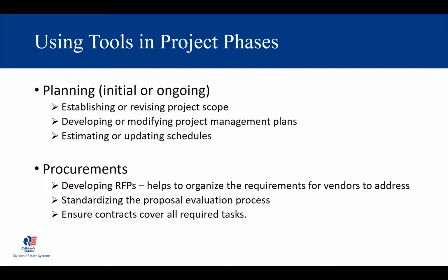For instance, if we start out with planning, the goals, requirements, and additional resources that are listed in the tools can really help you define, set, bookend your project scope during your planning phase. And of course, this can then help you flesh out your project management plans. The scope will help you develop your schedule and will actually help with cost estimates for budgets. So using the tools during planning can really give you a solid base for starting your project.